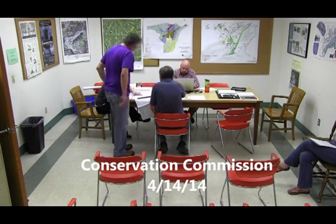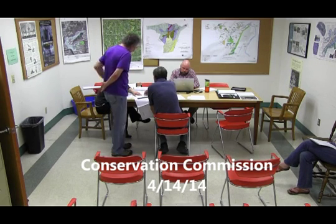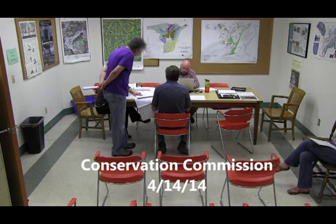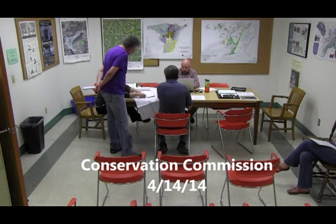Well, we were planning to do the road all the way to the bridge, but we weren't able to do the shoulders at the same width, the same configuration. So there's an extension. So you're making this a little wider? Well, the shoulders come out, but the slopes get steeper. Okay. So essentially, we're holding the bottom that was originally proposed by keeping a steeper slope.